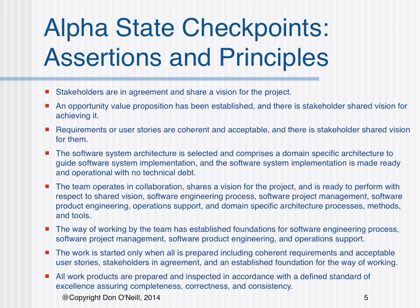Number six, the way of working by the team has established foundations for software engineering process, software project management, software product engineering, and operations support. Number seven, the work is started only when all is prepared, including coherent requirements and acceptable user stories, stakeholders in agreement, and an established foundation for the way of working.